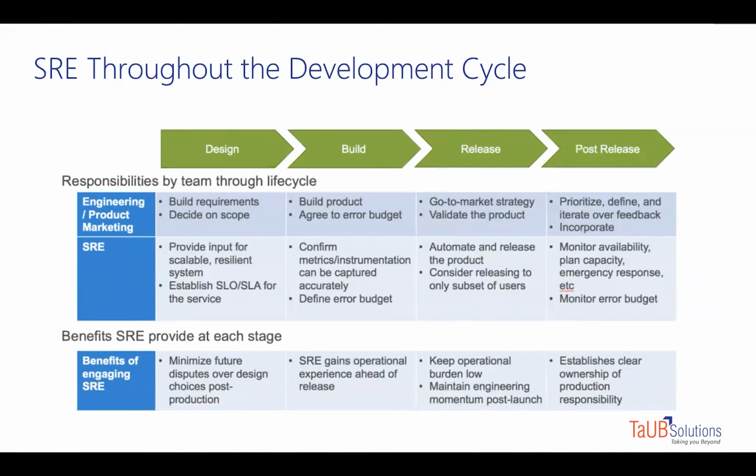So that's where the role of the ops people comes in. They have different ways of working. Some people call it ops liaison. That means they liaise with the development team, provide inputs as needed, and then go back to do their own work. The essence is, if we get them involved early, then you can fix the defect earlier in the life cycle rather than later, which will cost a lot more in rework.